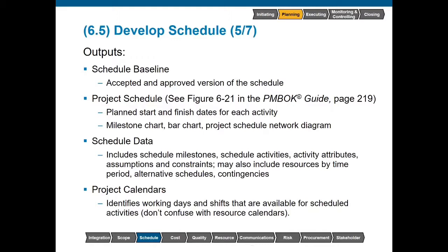We also have our schedule data. Schedule data is a companion document to the project schedule, so this could include more information about these activities, their attributes, assumptions, and constraints, and it may also include resources by time period, alternative schedules, and contingencies.